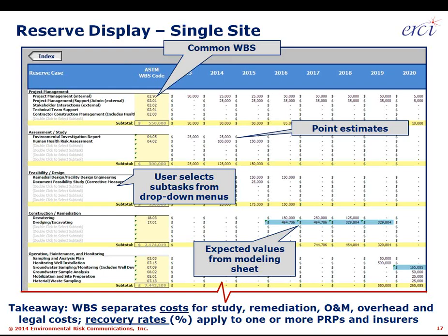We've got an Excel display here with a screen capture showing the common WBS tied to descriptions of each WBS element immediately to the left. Moving to the right, the years are in columns and cost forecasts are entered into cells. Where numbers are over $50,000 or $250,000, it's appropriate to do a bracketing process. We found through trial and error that if a number is above $250,000, it's got a lot of subcomponents and some uncertainty, and it's important to differentiate between what's known, what is expected, and what is hoped for.